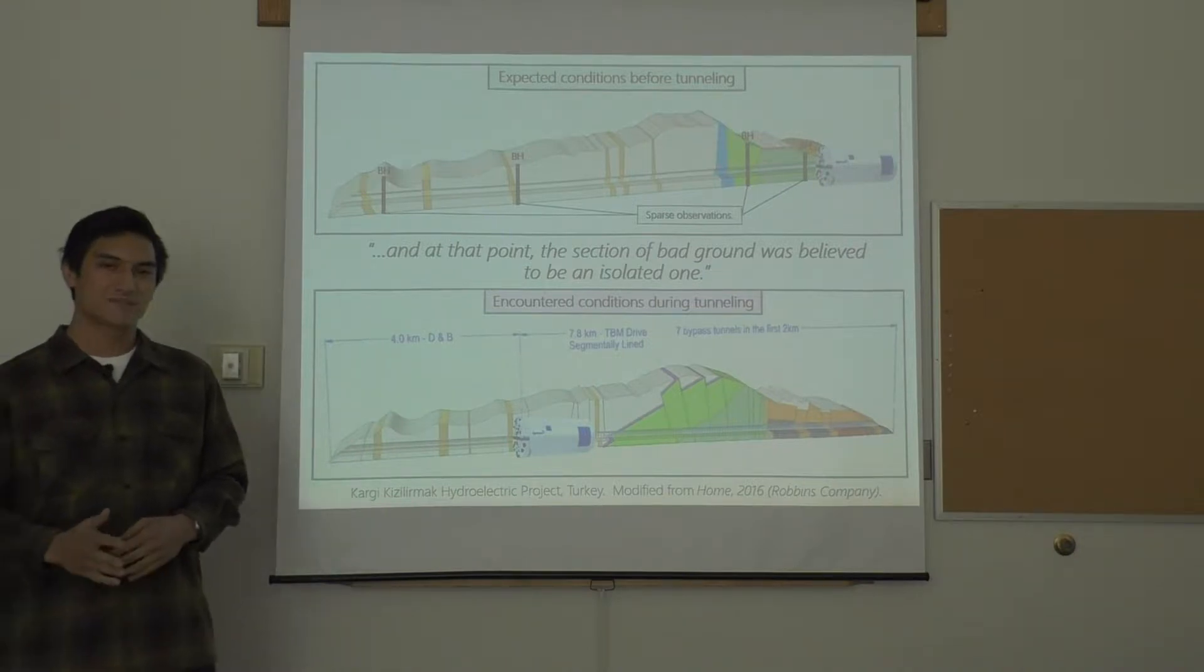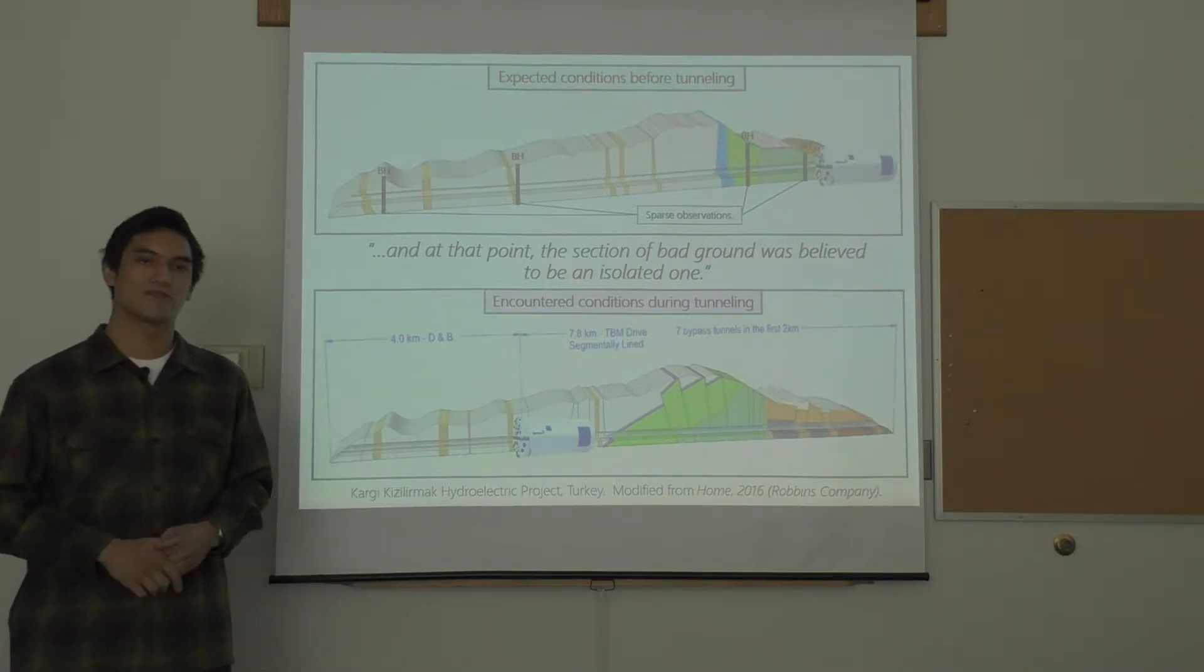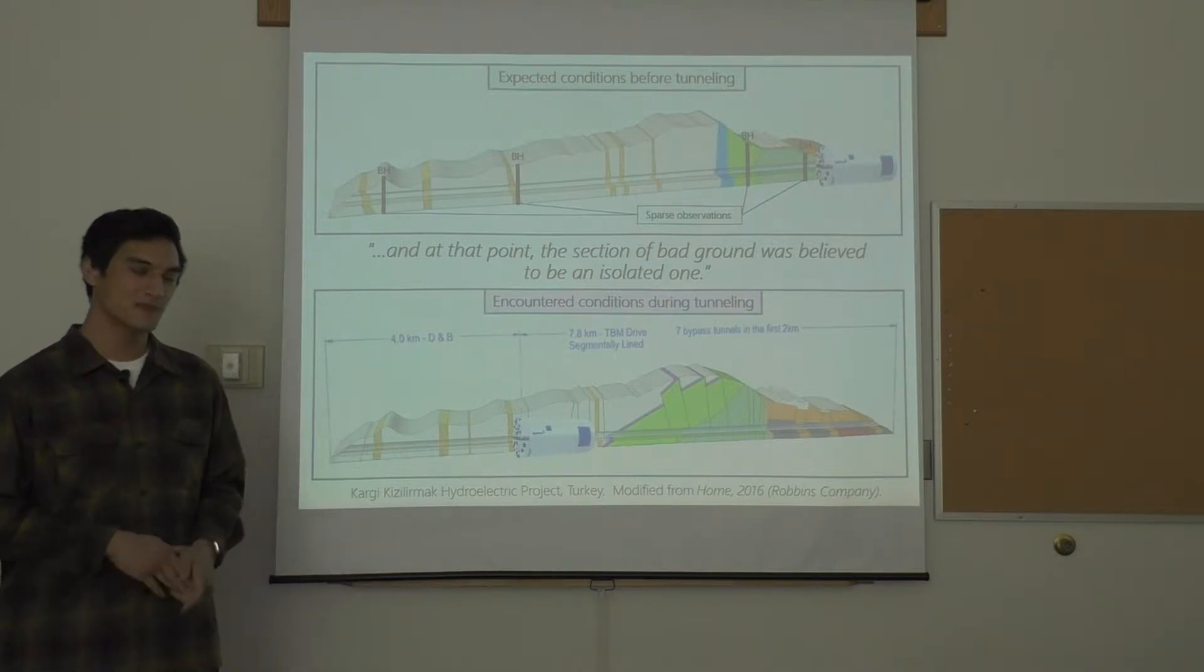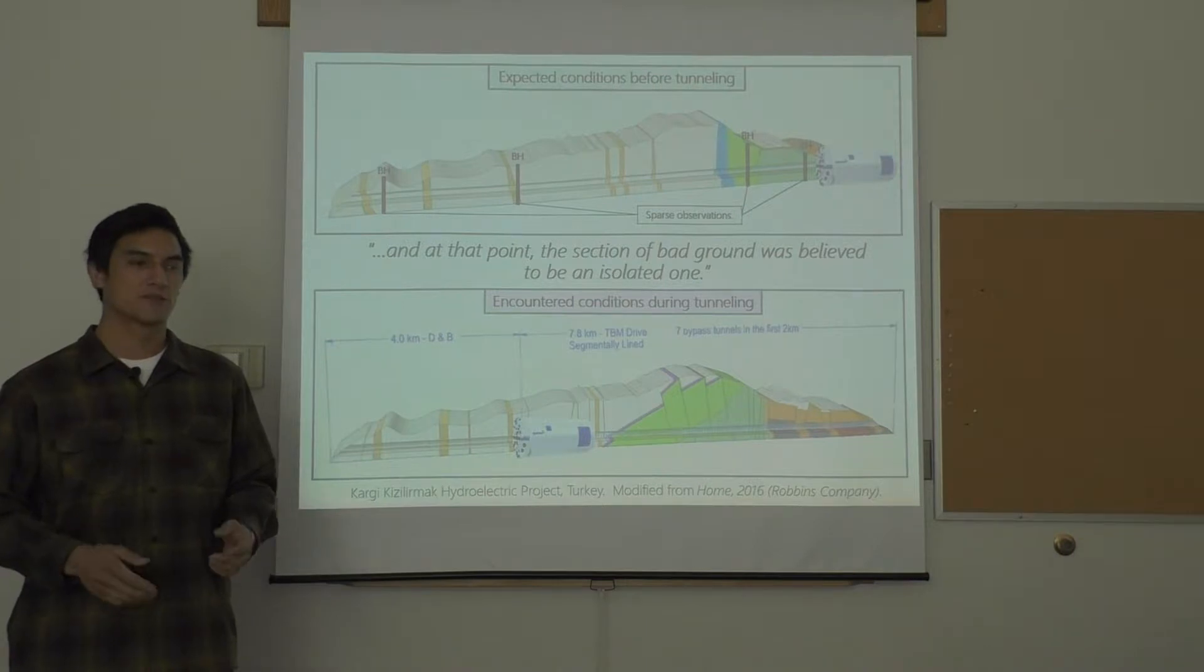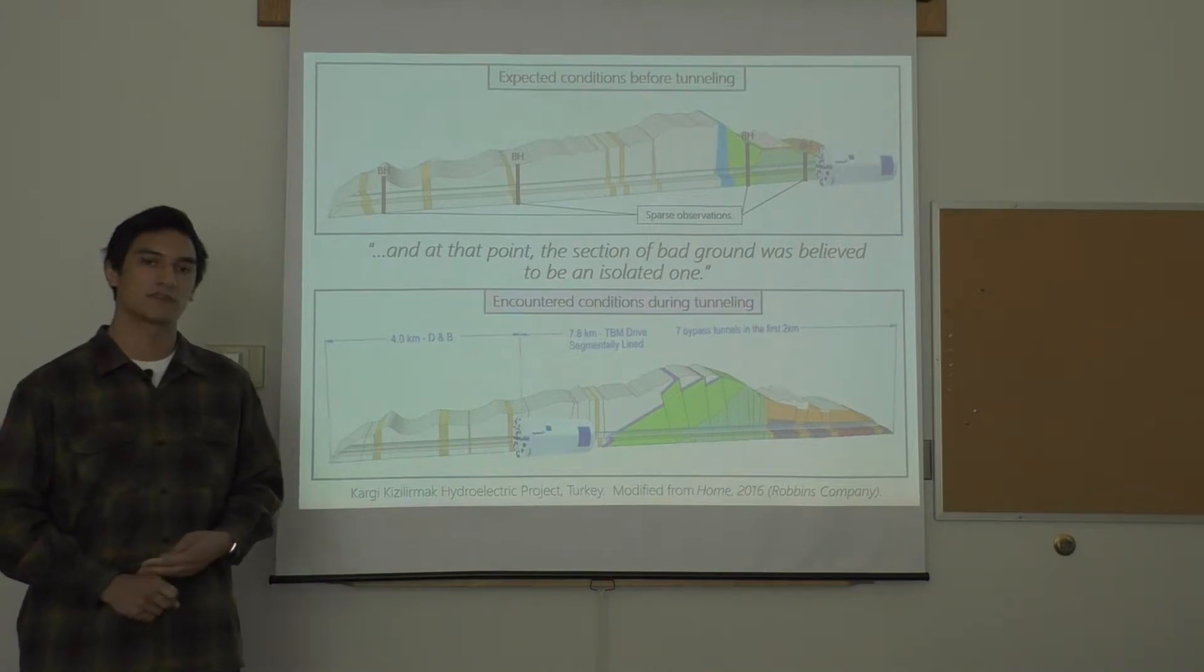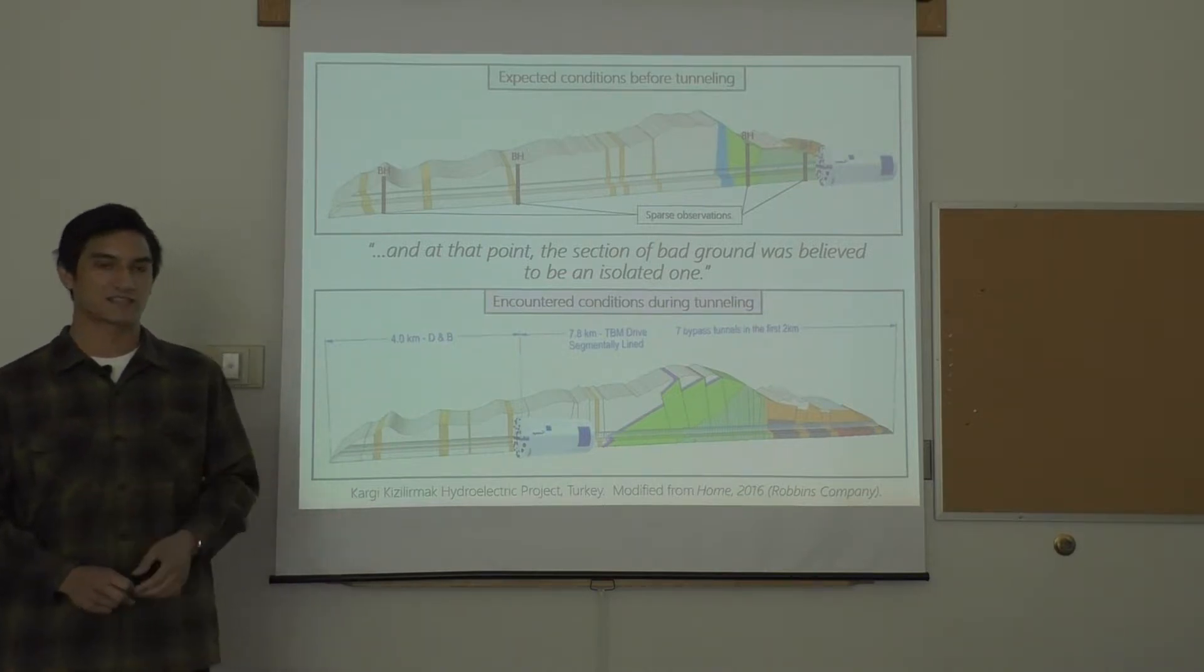A unique aspect of tunneling is the availability of new information describing the subsurface geologic structures that can be collected along the excavated portion of the tunnel alignment. The goal here is to integrate all available information to both better predict geologic structures prior to excavation and to update these expectations in real time in the face of new information gathered during excavation.